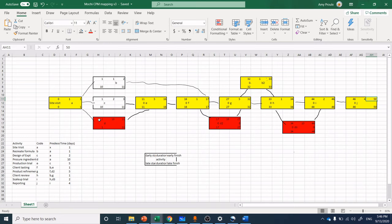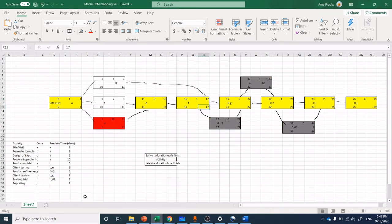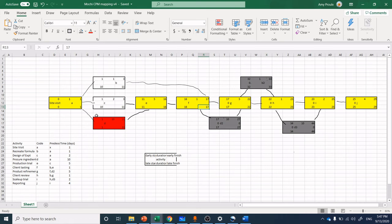What would happen if, as a product developer, you ordered everything in anticipation and you thought really robustly about the entire experimental design and only ordered once here? So 50 days finish time here. Let's jump into alternative scenario here. If we ordered absolutely, absolutely everything in advance. And so we made out a larger bulk order. This is something worth noting. We make a larger bulk order of our ingredients on the front end. And we make our product once. We make our reference product once here in B, and we do not repeat making that reference product here in B. Now our project is 20 days shorter.